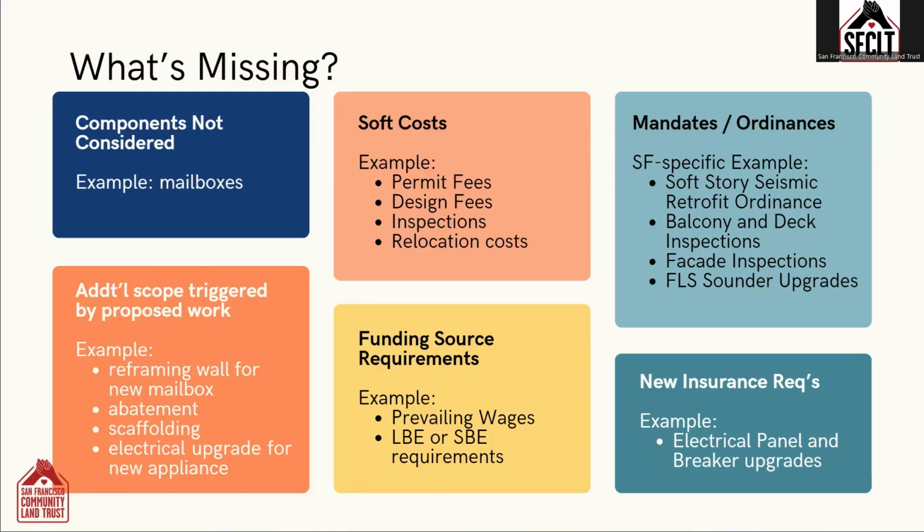We may have properties with balconies and decks that need to be inspected and structurally upgraded. We have a facade inspection ordinance, and then many of our properties require a fire alarm sounder upgrade. So be aware of the local mandates and ordinances, and make sure that you're capturing them because they are not listed in the CNA.